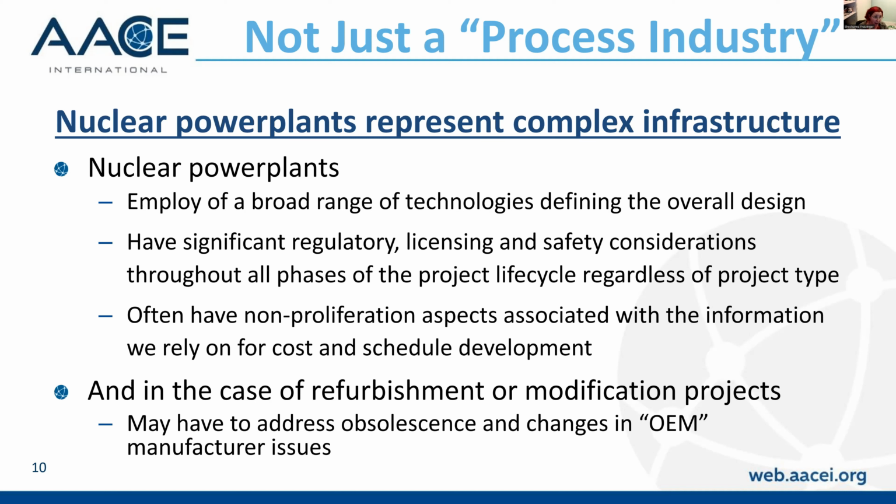So it's rather interesting when we're talking about trends in nuclear projects that it's not a one-size-fits-all from a benchmarking perspective. And of course, speaking of benchmarking, because nuclear projects often have non-proliferation aspects associated with them, when we're finding the historical information that we typically rely on to develop our cost and schedules, it can be harder to find and harder to validate.